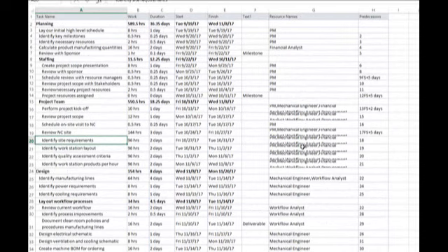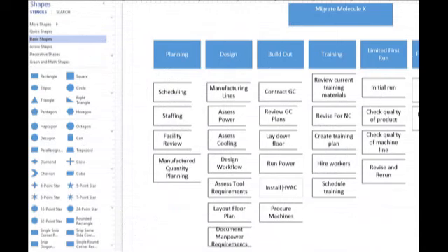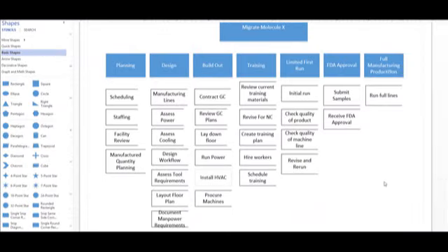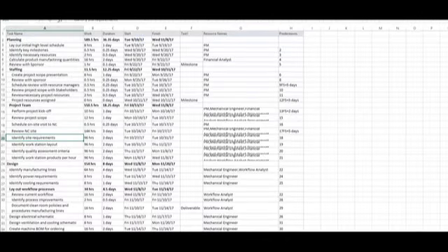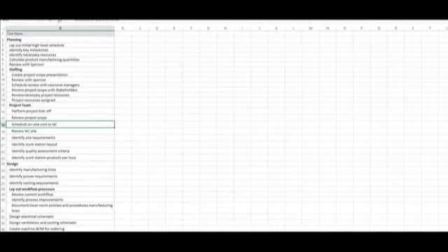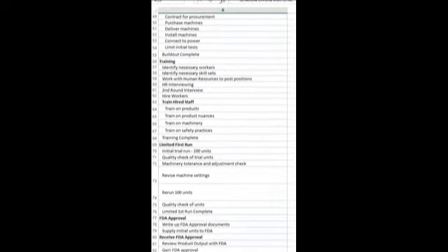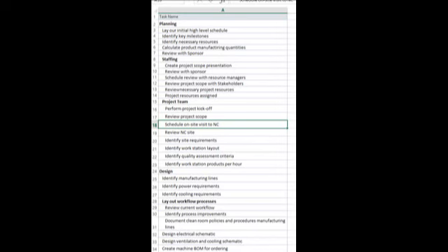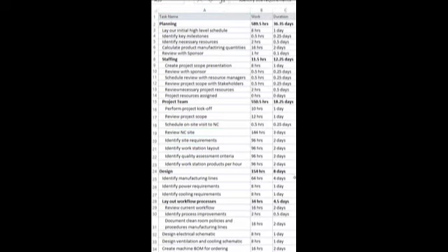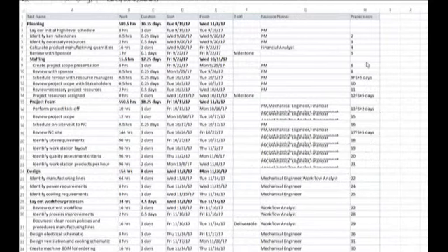And this is what is key to laying out our WBS. If I tried to do this at one time, I could be overwhelmed by all of the details. But by beginning with a graphical layout of the project work, I can take a high-level view of that work. I can decompose that work into a little bit more detail, listing the actual work items or the work tasks that need to be performed. And now I can estimate those work items, estimate the work effort and the duration, and define the sequence of events to come up with the final schedule for the project.